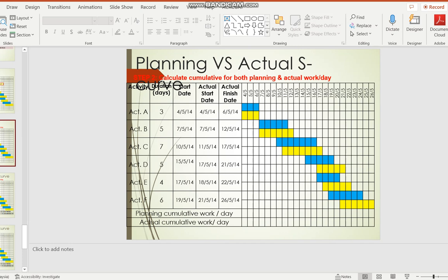Okay, so let's say for these physical ones, once you've done your planning, you've shown your physical S-curve. Like I said, it's important because most clients want to know how you plan it and how they can match you, especially in terms of money. So in terms of money, like I said, government agencies, at the end of the year, if in that physical S-curve the cumulative has already gone up to a certain percentage, they will make sure that they are expecting some claims, some money, they're expecting work to be done to that level, and then they'll be paying this much money, especially in November and December and January.